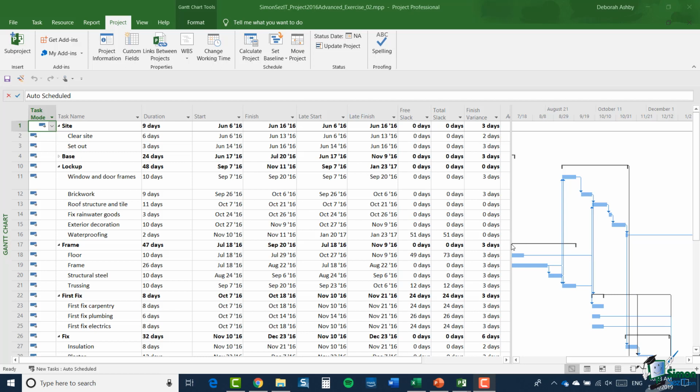type flag. Now, if you check what each of the types of custom field is in help, you'll see that a flag field is a data type. And you need to make sure that the value of yes is set for any task where the finish variance is 5 days or more. I'd also like you to set that in the appropriate summary task as well. So if a summary task has a finish variance of 5 days or more, I'd like that to have the value yes in this new custom field type flag.